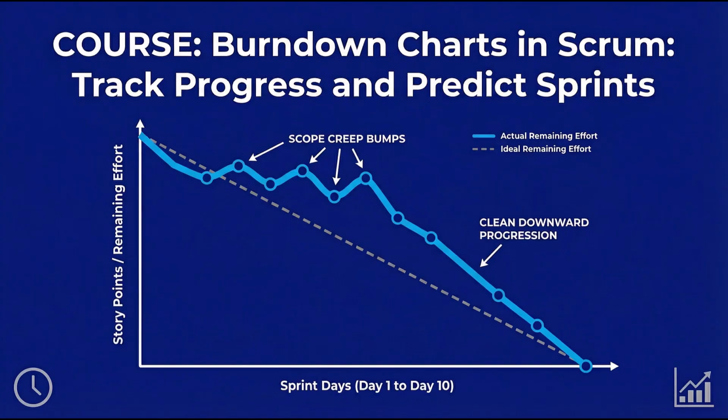Before, a taxpayer registry modernization team showed the scope creep signature. 4-6 upward bumps every sprint for 2 months straight. Diagnostic. The product owner was adding critical fixes based on production issues without removing anything.